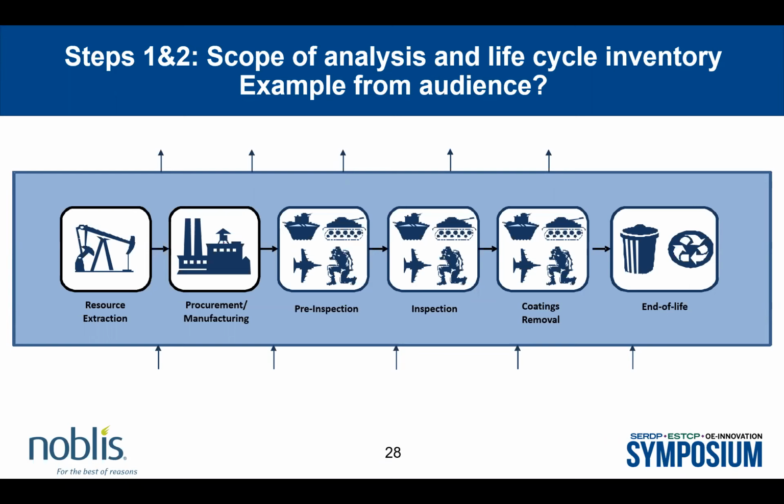Okay, now we'll jump into the exercise about how to estimate costs. Give you a second to think about this, but what we're doing here is thinking about, in the costing terminology, they say cost elements, or what are some inputs that we need to estimate costs. Storage volume, sure. Energy cost, that's right. And we might call that a procurement cost of material or energy. That's right. Yeah, that's great. It's not only about what we're procuring directly, it's also about the outputs and cost of the waste. And in fact, that's an important one because that often doesn't come out of our budget. The base pays for that. So sometimes that can be easy to forget.